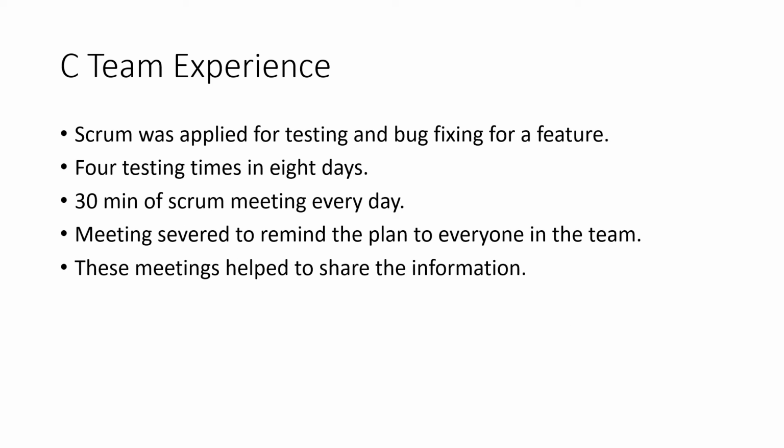Let's see the C team's experience. The C team experience was very successful when compared with B. A and C were both successful because the Scrum for the C team was applied for testing and bug fixing of a feature that they had developed, and they had 4 testings within 8 days. Every day they had a 30-minute Scrum meeting where they discussed the load of their testing, how much progress they had made, and how many bugs they had collected so far.